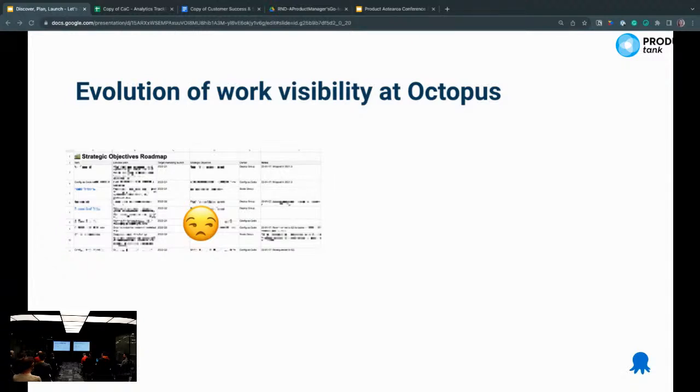We still relied heavily on meetings to keep up to date with who was doing what, and what is coming up next. And well, teams ended up building accompanying visuals of their roadmaps, but everyone used their own format. So it was very difficult for stakeholders to digest different formats of the roadmap and reconcile it with a spreadsheet.